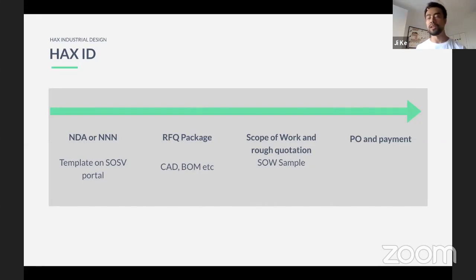If it's a simple email that says, hey, this project is going to cost you 50K, you want to avoid that manufacturer, right? If it's a very clear scope of work and quotation that says, hey, our factory is going to do X, Y, Z for you, and then the BOM, the cost is this, the markup is this, the lead time is this, and we're going to do assembly, certification, verification, and 3 iterations for the PVT, then that's on the good and better side. So the more detailed the quote is, the more they pay attention to your work.